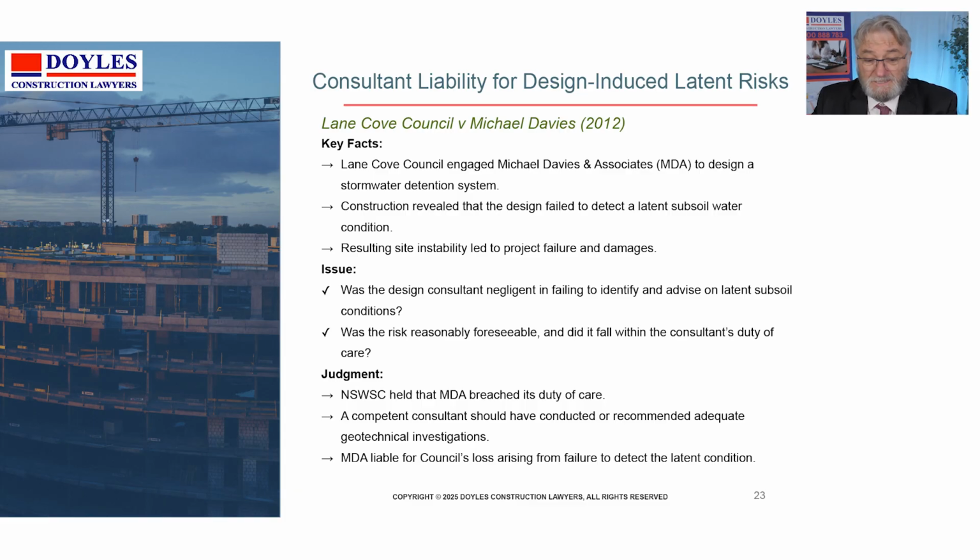The issue in that case was, was the design consultant negligent in failing to detect it? And next, was the risk reasonably foreseeable, and did it fall within his duty of care? The Supreme Court held that Michael Davies had breached his duty of care, as a competent consultant should have conducted or recommended adequate geotechnical investigations, and MDA was liable for the council's loss arising from a failure to detect the latent condition.